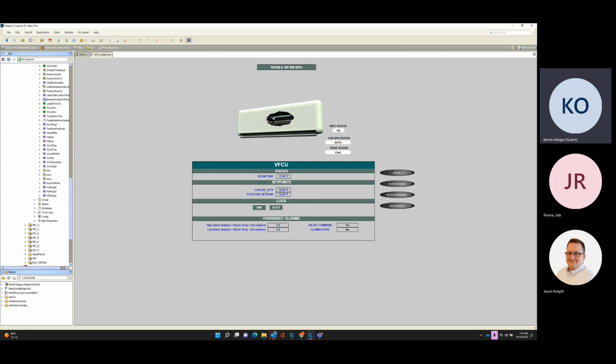So I have a question. On a lot of these new sites, I'm finding that contractors are not following what should be in the contract, and that is a hardwired thermostat for these mini splits. Instead of relying on the wireless battery operated thermostats, do you happen to know what's going on at this site? Whether there are hardwired thermostats that do not take batteries for this?